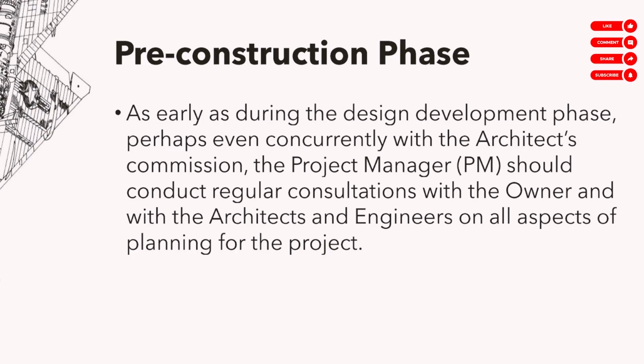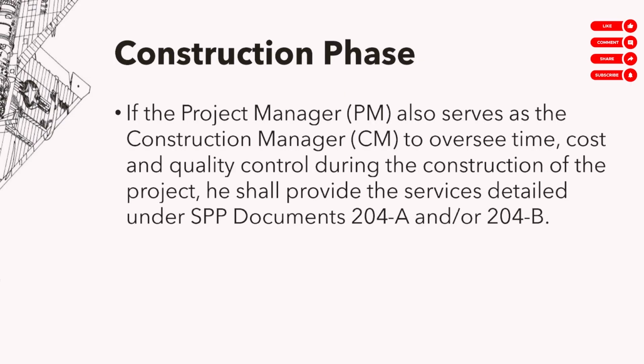Okay? So, the earlier the better, in other words. Kasi if you hire this person later, then parang sayang din. Hindi rin niya na-witness the entire duration. So, ideally, during the design development phase, nag-hire na kayo ng PM. Kung pwede nga raw, earlier pa, kung pwede kasabay ng architect, i-hire yung PM. Para, as in, literally from the start of the design, may PM ka na. Okay? Sometimes the PM could also function as the CM, like yung wala na separate CM, in-absorb na ng PM yung CM duties, in which case, the PM will also render the services enumerated in 204A and 204B. That's a common setup as well.